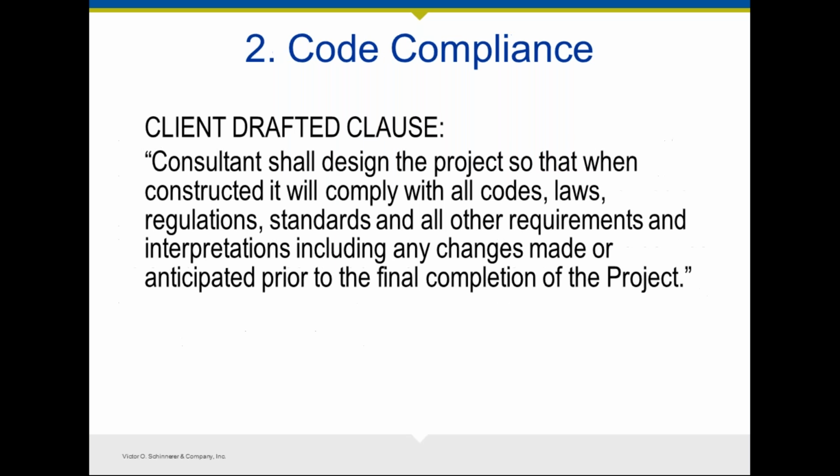All right, let's move on to code compliance issues. Again, the client has concerns about code compliance that they're trying to pass on to you. And here's an example of a client drafted clause in regards to code compliance. "Consultants shall design the project so that when constructed, it will comply with all codes, laws, regulations, standards, and all other requirements and interpretations, including any changes made or anticipated prior to the final completion of the project." Well, obviously, this is too broad a statement for a reasonable design firm to agree to.